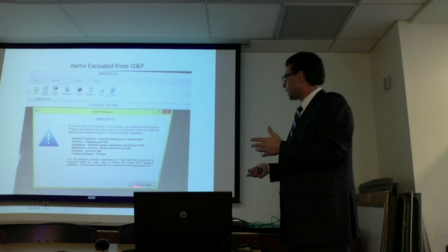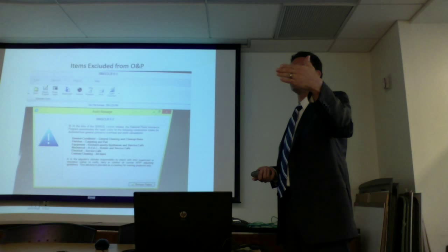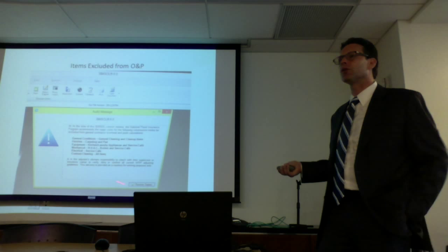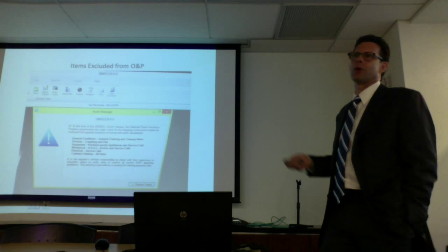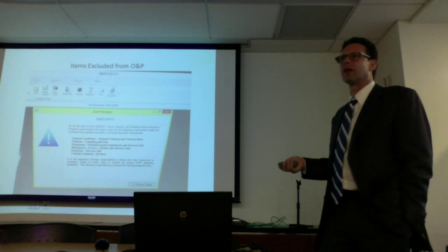What an adjuster should do, an estimator should not know any different. What an adjuster should do is say, I have to match the item to whether or not a general contractor, whether it is applicable to overhead and profit. And I go in exactly, check that little box off, and that's done. I'm a responsible guy. I've never talked to one CAT adjuster who wrote with SIMSOL who knows that if you click the X to just close it, then it just goes away. They sit there and say, no, you have to do it because it's in the flood thing, and NFIP and FEMA say you have to. FEMA doesn't say you have to. The NFIP doesn't say you have to. But in this program, you have one option to say yes. That's why you have all that missing.